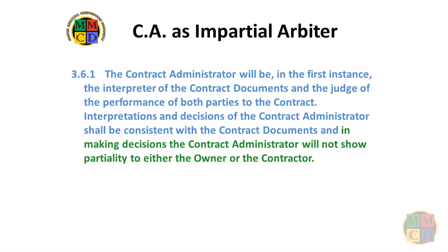There are three key elements to this clause. Number one, the CA makes all decisions in the first instance. This means that all decisions are subject to potential review under the dispute resolution process, providing one party files a formal dispute notice within 10 days.